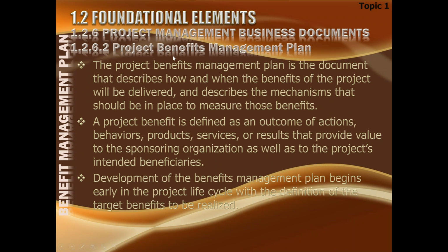Second project document is the project benefits management plan. This is not exactly the realization plan. There is another thing which is called benefit realization plan. That is not part of this PMBOK. That is normally a business analyst's job, to create a benefit realization plan. Or for that matter, in program management, we have the benefit realization plan. But the benefits management plan is generally describing how the benefits can be managed on this project. A general guideline on how the benefits can be managed on this project.